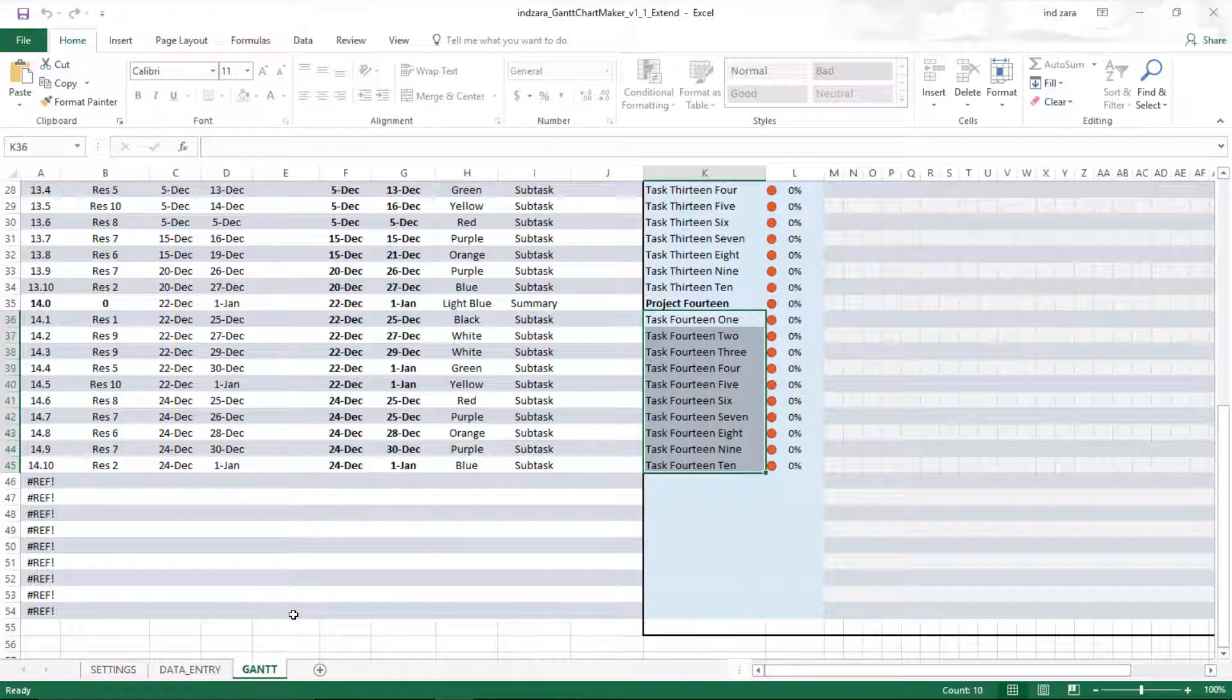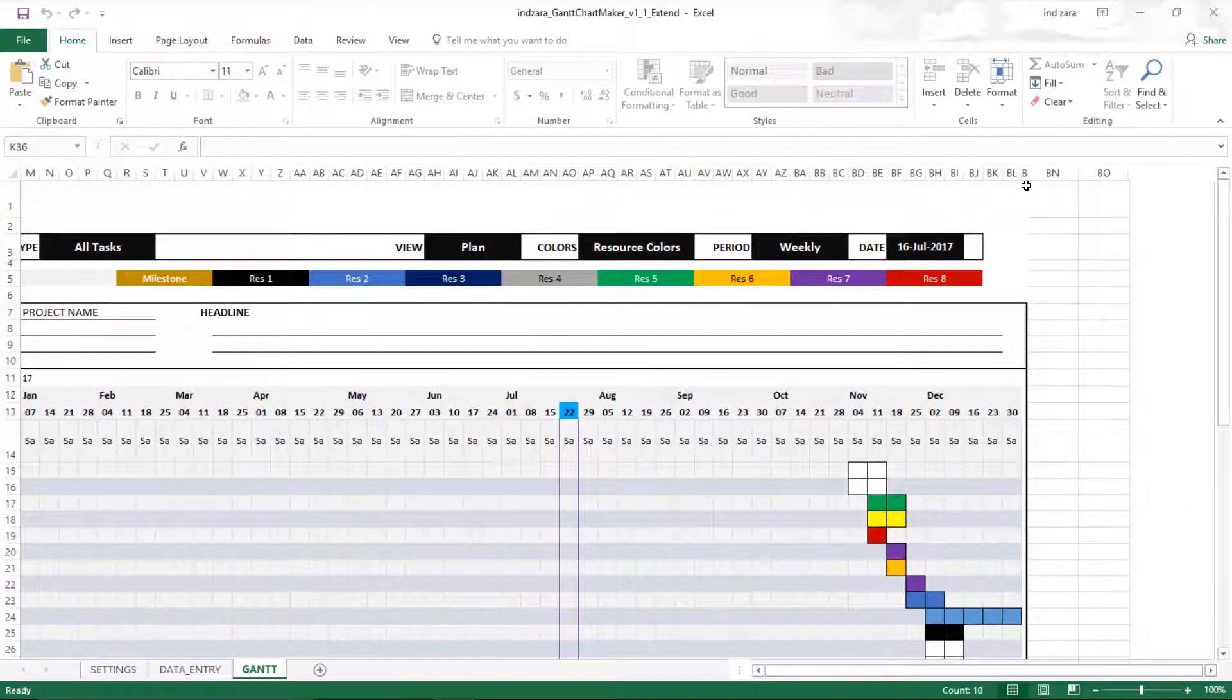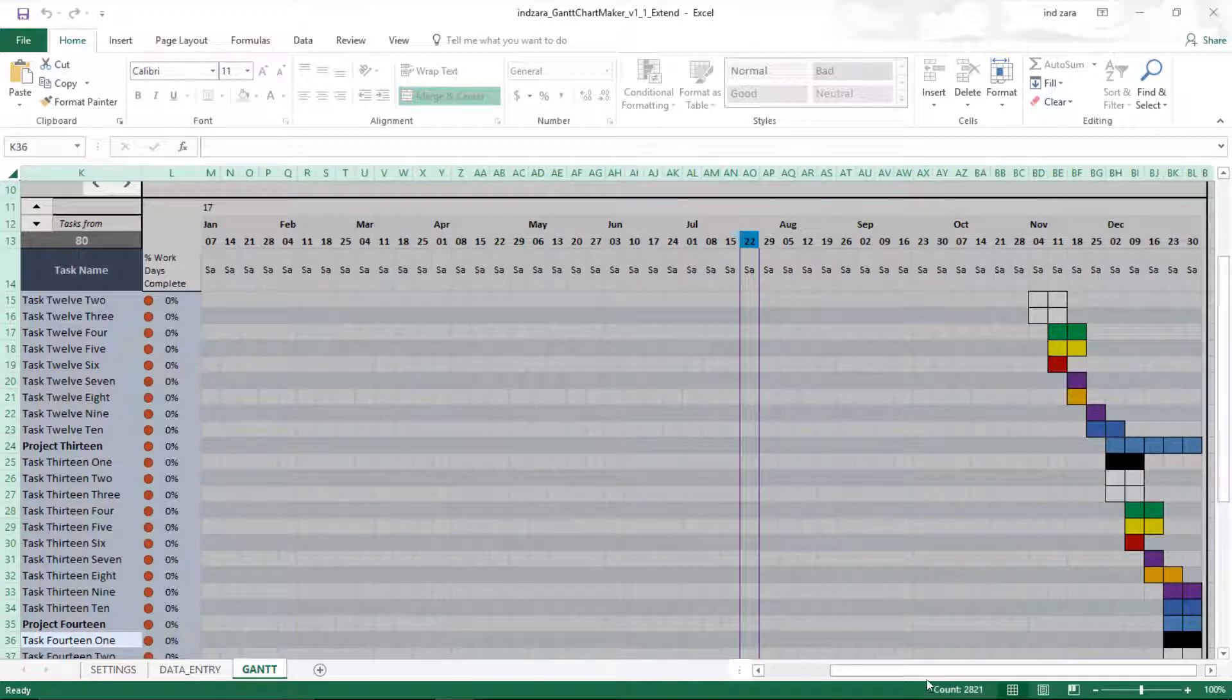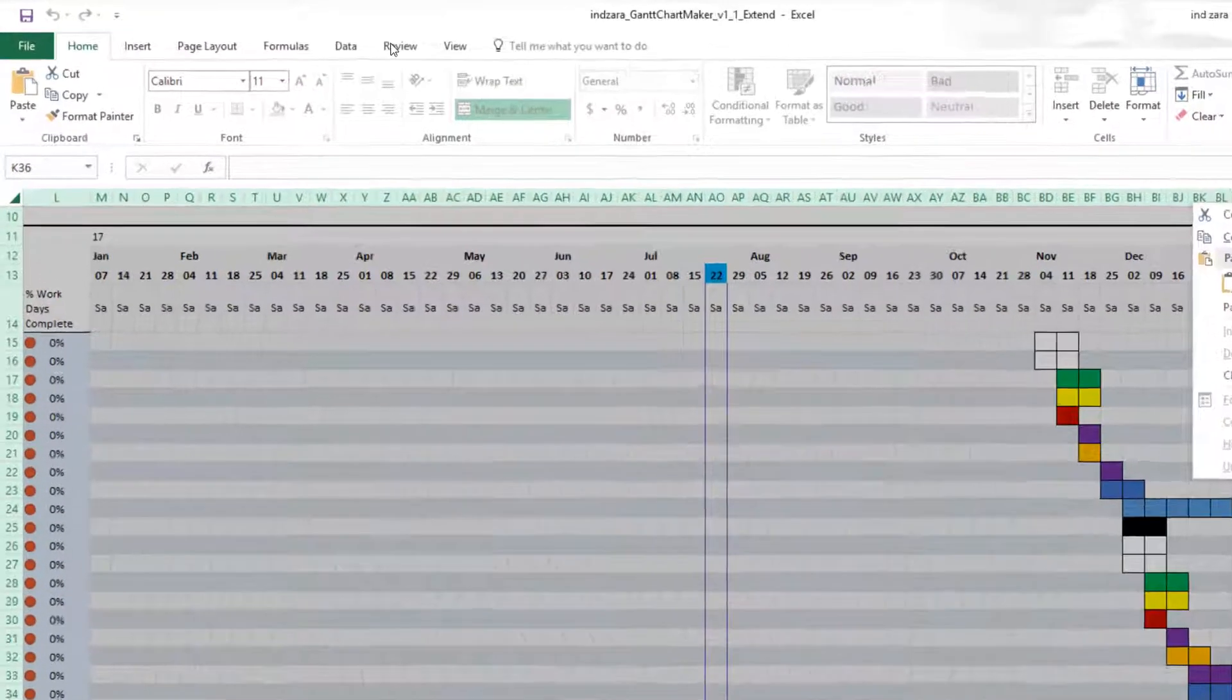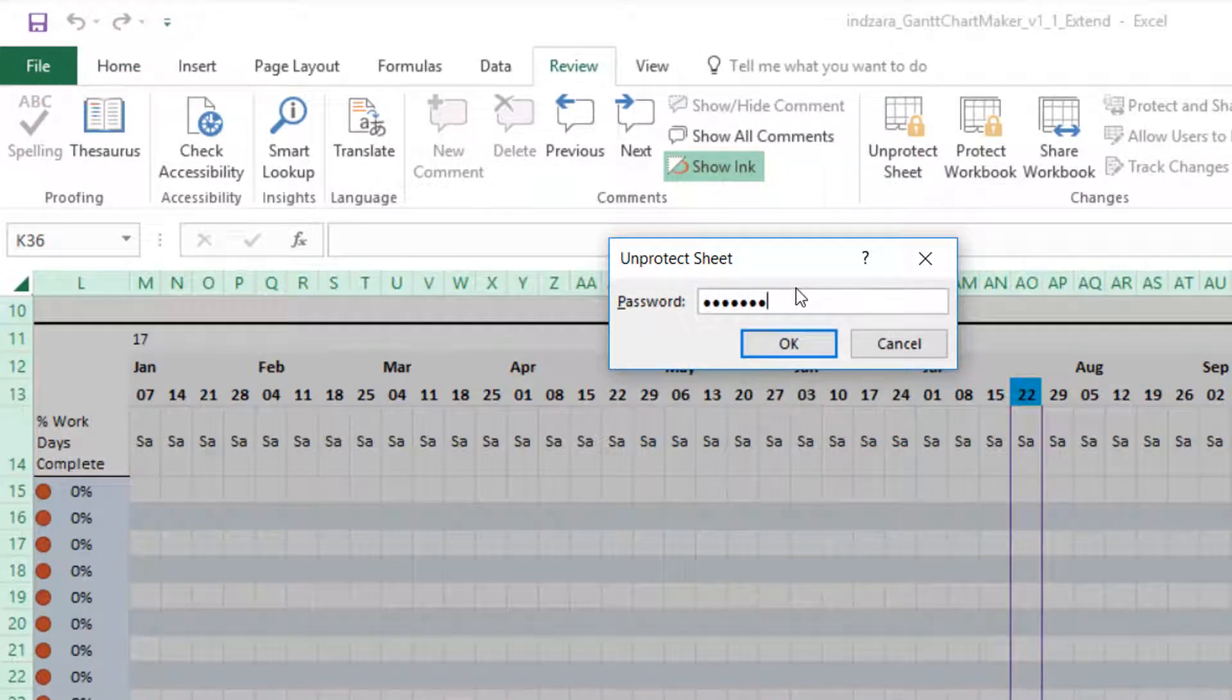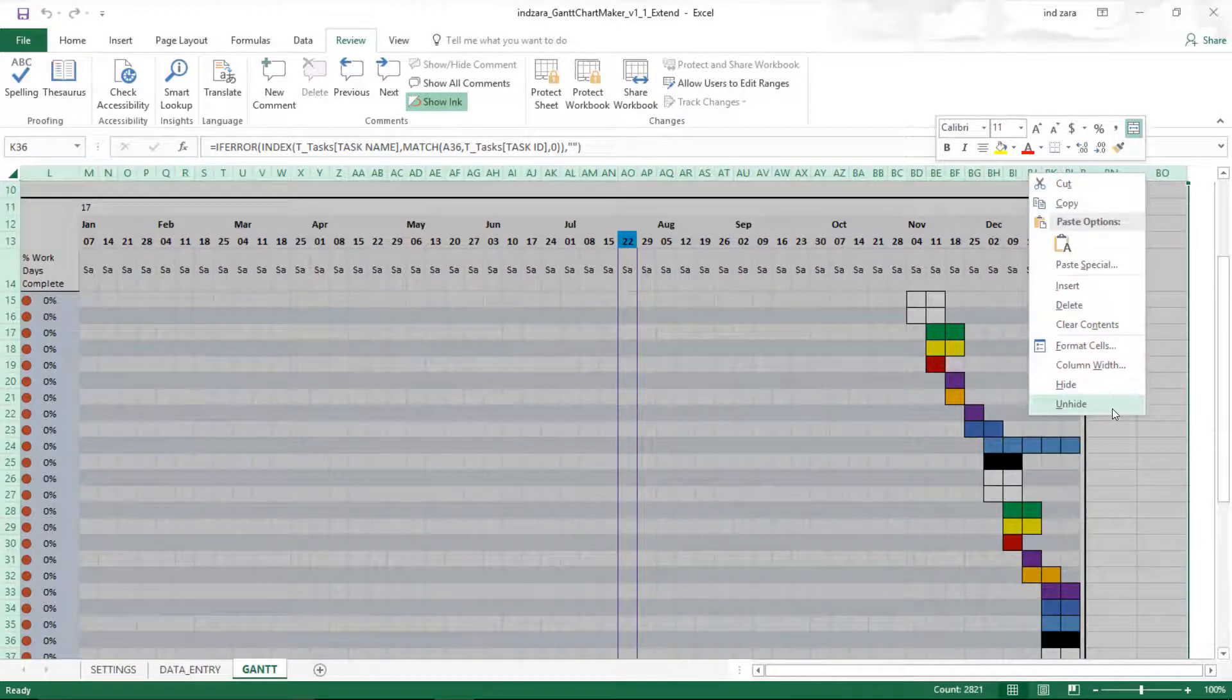Now let's move on to the next extension—how do we extend how many columns we show here. By default, I have set it up such that columns are hidden. So we're going to first show all columns. Press control A, which selects all the columns available. Now I'm going to right-click. However, we don't have the unhide option. In this case, that means the sheet is protected. So we're going to go to the review tab first, unprotect, enter the password 'inzara' in lowercase. Now come back here, right-click. Now you'll see the options to unhide. We're going to click on unhide.